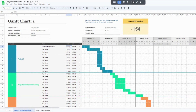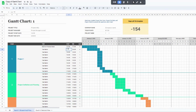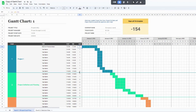To activate the automated Gantt chart, this is where your start and end dates come in. I'll change a start date to 1/7 and you'll see how it automatically pulls in additional color blocks, then change the end date to 1/7 and you'll see how it shrinks the color blocks. All of that is automatic — just go ahead and start populating all of your start and end dates. The number of days to complete each task automatically calculates, and all the colors match each project phase.